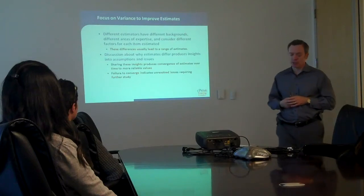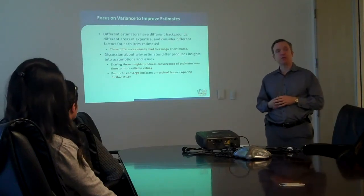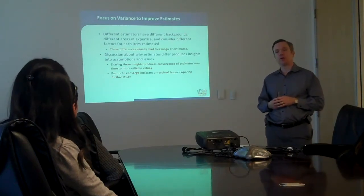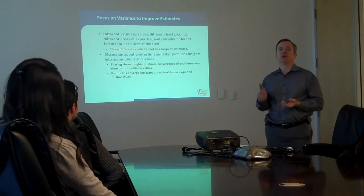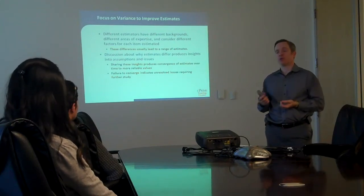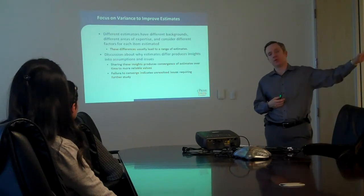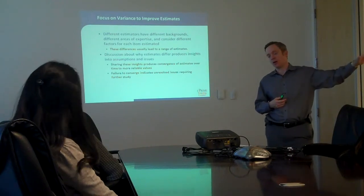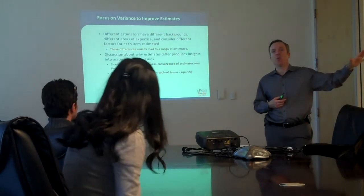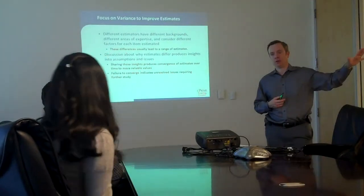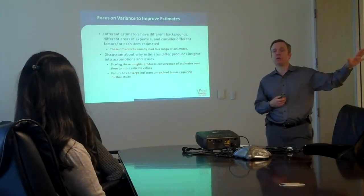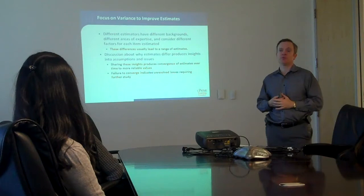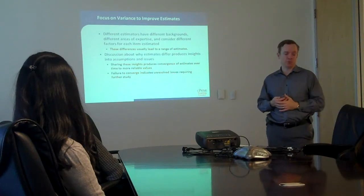It occasionally happens that we will have something that seems straightforward and clear when we start to estimate it, but we can't converge. That's a clue that there's something wrong with this problem. We need to pull it out of the session, go back and think it over again — figure out why we are missing the results and what needs to be done to make it possible for us to estimate these more accurately.